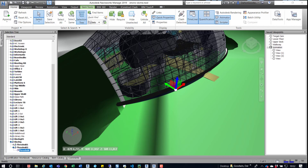So the question was to add an animation for camera rotation, but also for the sets — the elements in there — to move as well. So while they're being built, they're kind of moving around. Something like a crane being moved around the site. That's easy to do with animations, but as far as I know, you cannot incorporate an animation of an element being moved, such as a crane or any piece of equipment, while you're running the simulation on Timeliner.